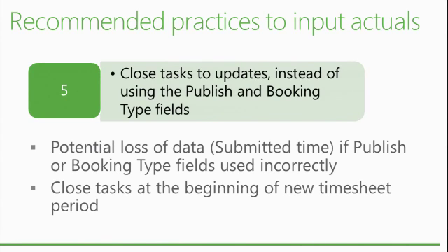All right. So the last thing is to close the task to update. We have a new feature also in 2010 that allows you to basically lock down tasks so that you close them and you are sure that no one is going to input any time in them. Because that has happened in the past, right? Where you didn't have a very good way to really block updates to tasks that were still showing up in the timesheet, that were not complete and everything. So now you can actually close a specific task. There is an option to do that, to update, and then that will prevent users from altering or inputting any updates on these tasks that are closed.